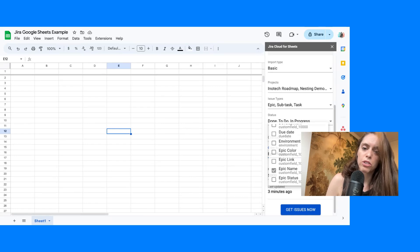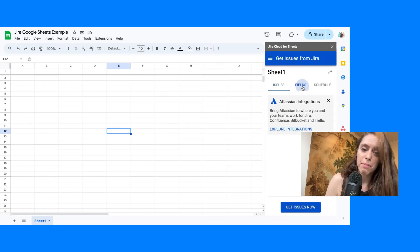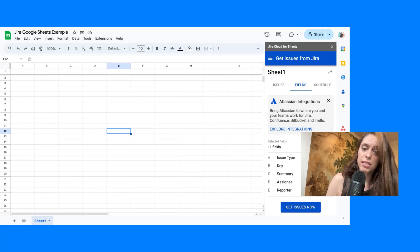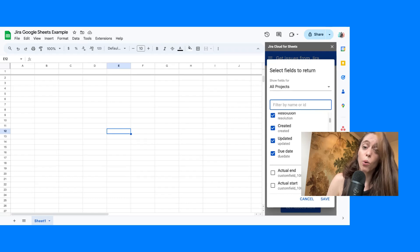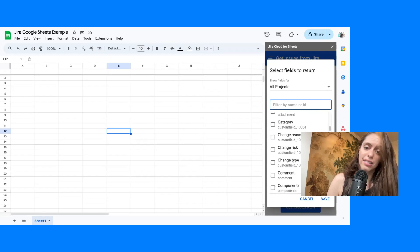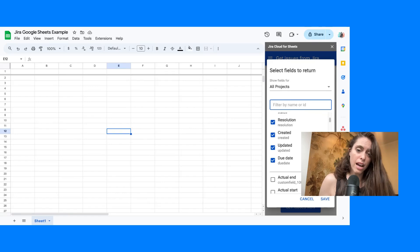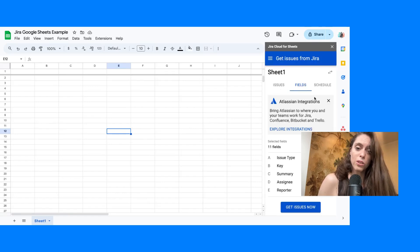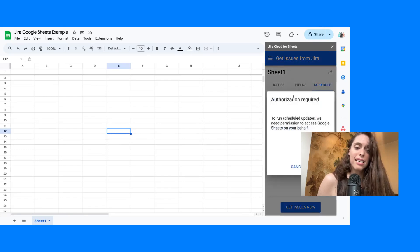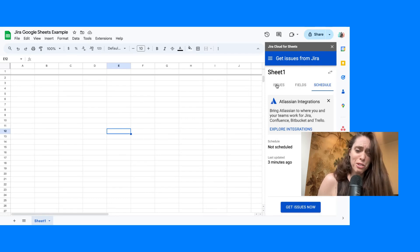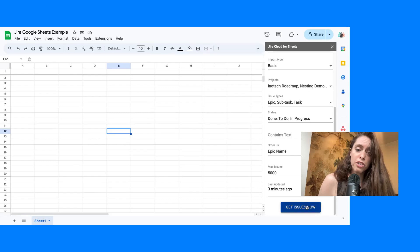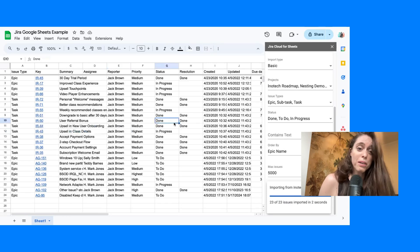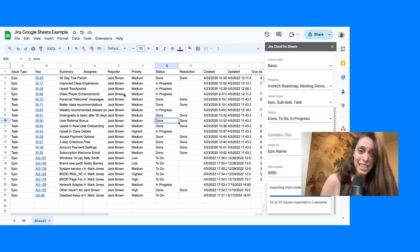There are some pre-selections there that are more typical. I'm going to go with epic name. And then you can have the max amount of values. You can preview the fields that you're bringing in. There's some default ones that are more popular, but if you go to edit, you'll see a whole bunch of fields that you can decide that you want to pull in. Your instance might not have all of these, but you will see the normal usual suspects there. And you can even schedule syncs between Atlassian and Google, but it does require some more authorization. So once you're done, you can just hit get issues now and you will see that a whole bunch of issues got brought into Google Sheets. Pretty neat.